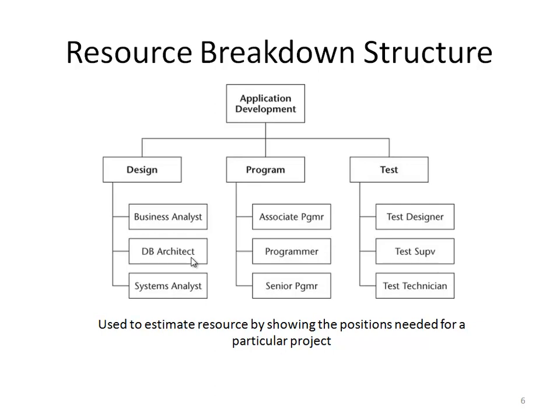This diagram, for example, can be included in the work breakdown structure, but it will be too busy. We can make all of them, like the requirement, resource, and work breakdown structure, be included in one chart or one diagram, but it will be so busy. So that's why we separated them. So we have three different diagrams: the work breakdown structure, the requirement breakdown structure, and the resource breakdown structure diagram.